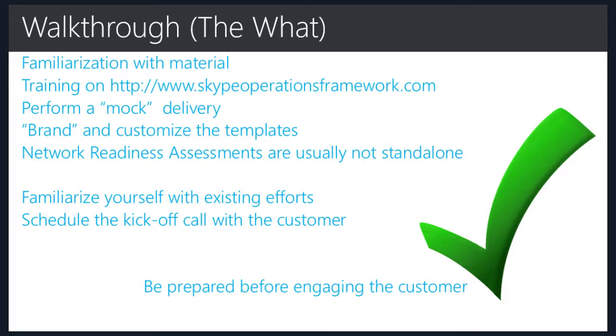So what are we doing in the preparation stage? We'll familiarize ourselves with the material. You'll follow the training on skypeoperationsframework.com on Skype Academy. You should be doing a mock delivery of these materials, unless you've already done several of these. You must brand and customize all the templates. Add your deployment partner's name in these and edit when necessary.